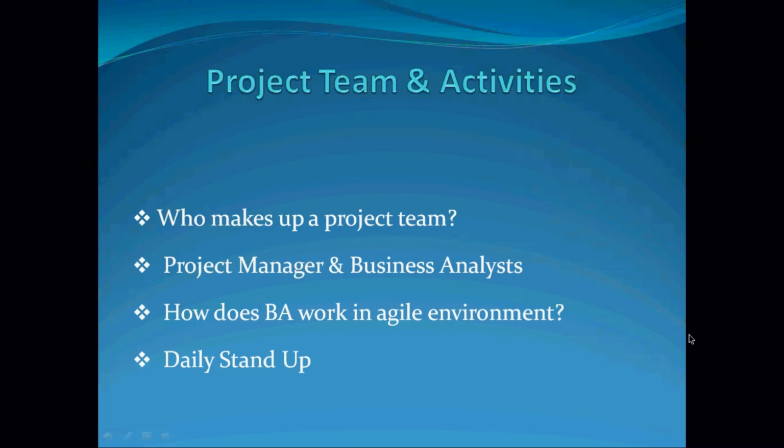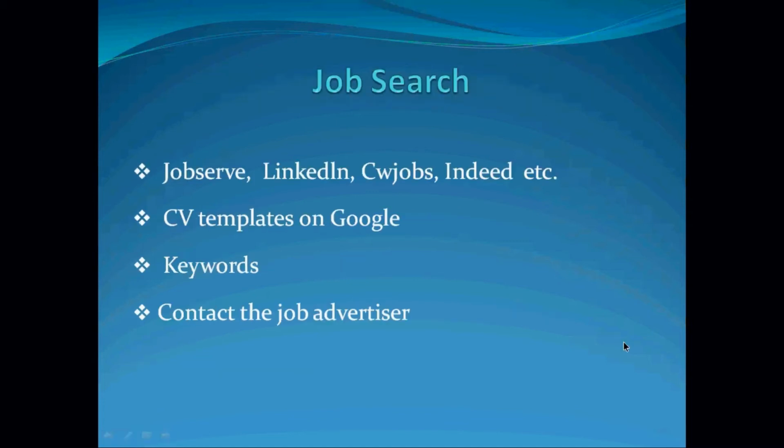Even if it's something that you need to give more detail on, you can say, we can take that offline, or I will discuss with you after this meeting. So you can discuss it after the daily stand-up. But if you say you are having daily stand-up, it's just key points. I delivered this yesterday, or I'm still working on this, I've not completed it, and if I finish that, I'm working on this next. So just high level: what you've completed, what you are going to do, and if there's any blocker. So that is on the daily stand-up.